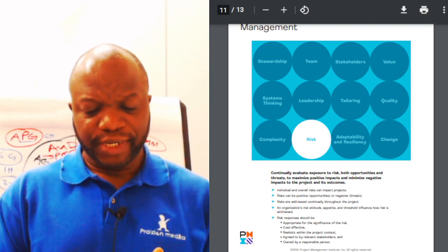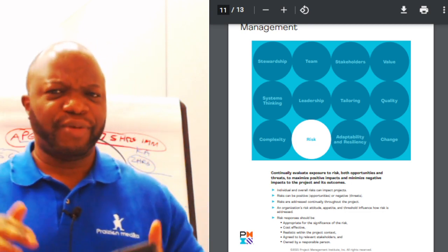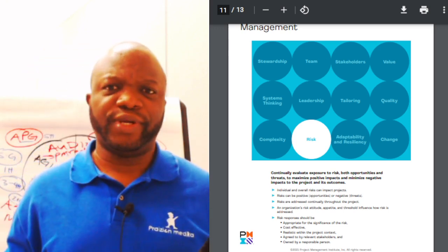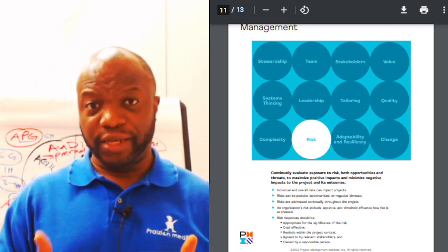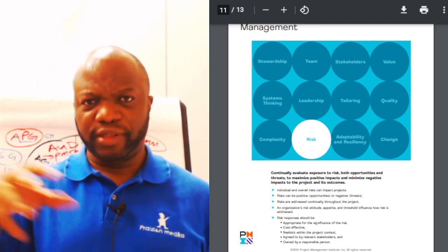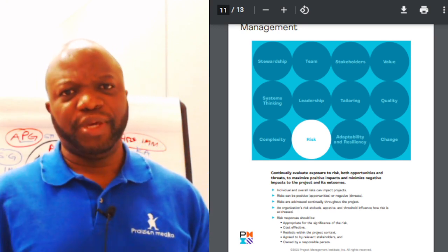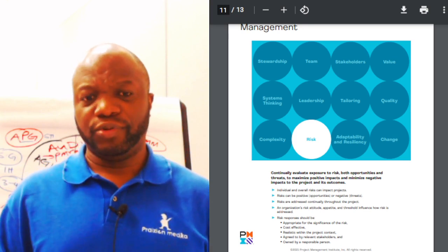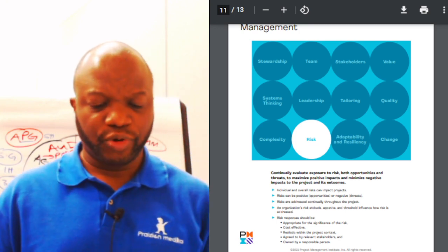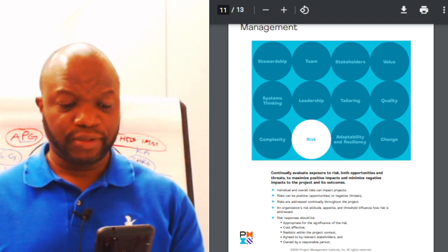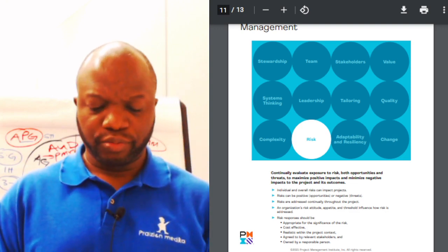It says here, risk responses should be appropriate for the significance of the risk. So imagine a big, humongous risk, an opportunity, just waiting for you to harvest it, and you leave it lying on the table for another firm to come pick up. Seriously? No. You as a PMP need to be sensitive to the concept of positive risk. It says risk responses should be appropriate, cost-effective, realistic, agreed to by relevant stakeholders, and owned by a responsible person.